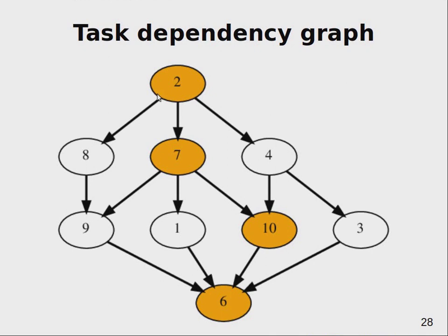So if you can do something in parallel and the total amount of time needed is actually shorter, if something is delayed in these other parts of this graph, the actual deadline will not move. But if something gets delayed for these 4 tasks, then you will miss your deadline, because all these tasks are contributing to the overall length of the project.